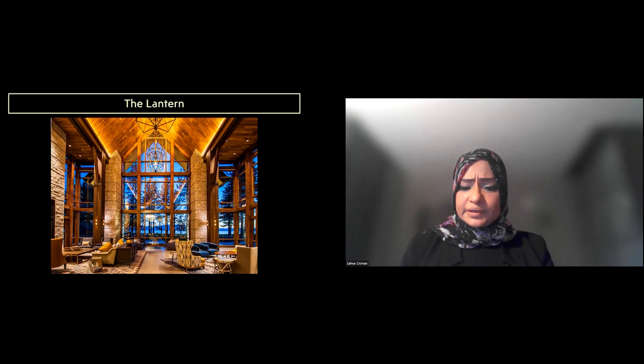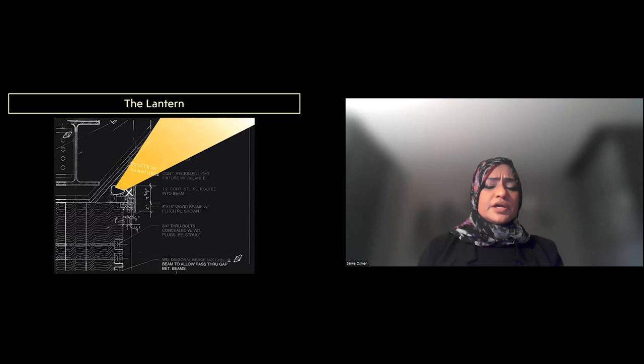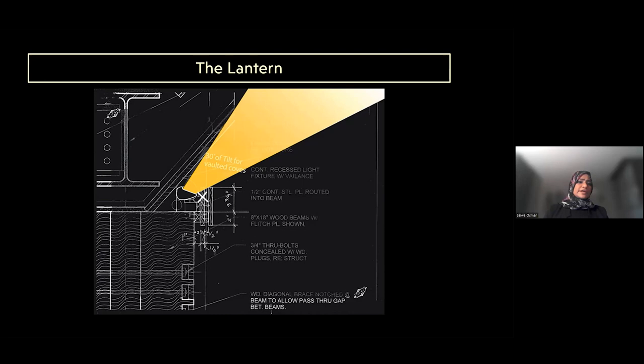This was a sketch showing the detailing of the cove for the cathedral ceiling. It went through four or five iterations after construction started. And all these adjustments had to be made because of field conditions, or because the product had to be value engineered because of cost or revised because of lead time issues.